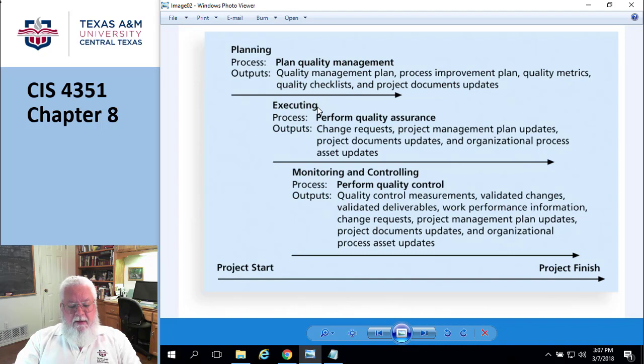Okay, cool. So one of the main outputs of some sort of a quality control activity. There's a bunch of them, and three major outputs they talk about. One is acceptance testing. Acceptance testing basically is a go, no-go. There typically isn't shades of gray. It either passed or did not pass. It's some sort of a threshold that says, of this particular sample, and we'll get into sample sizes a little bit later, I pull some samples, and if more than 4 of them have defects, I reject the whole lot. So that's kind of how acceptance testing works.